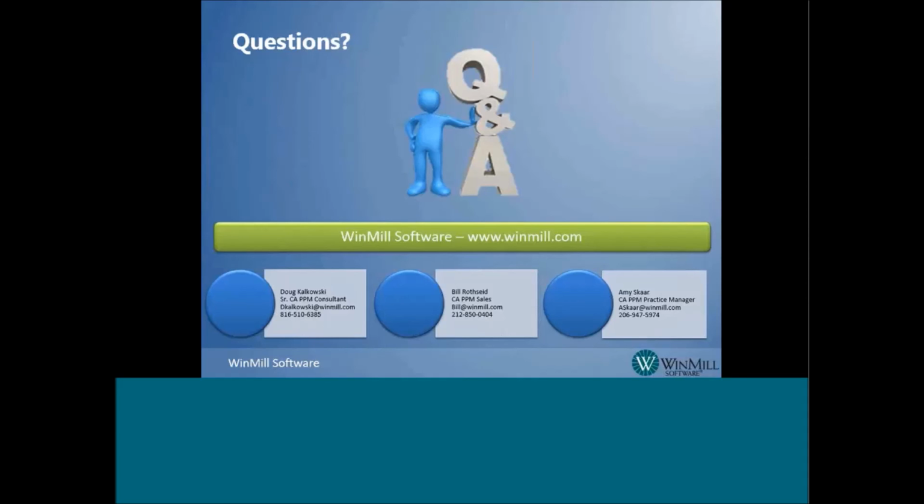Okay, great. So who from an organization would typically be needed in order to participate in those initial discovery sessions you were talking about? Right, yeah. The discovery sessions are the key time that most of the involvement is needed. We typically want someone who's going to be the CA PPM owner, so usually there's an application owner involved, or if they have a formalized PMO, having a PMO lead there. The project sponsor is usually a good person to have involved, and also resources from your finance department, finance managers, and any resource managers that can give some input on the resource management process. Sometimes it's good to have a PM join those sessions as well, just so we get the input of all the levels of the organization.